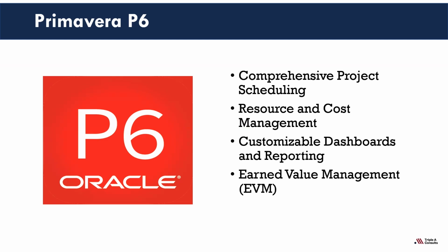You can use it to manage your resource and cost, use it to manage your risk, use it to customize your dashboard, and use it for your earned value management, which a lot of these tools do not have, right? It helps you track your project performance, your cost efficiency in real time by measuring the actual work that you completed against your planned work and budget.